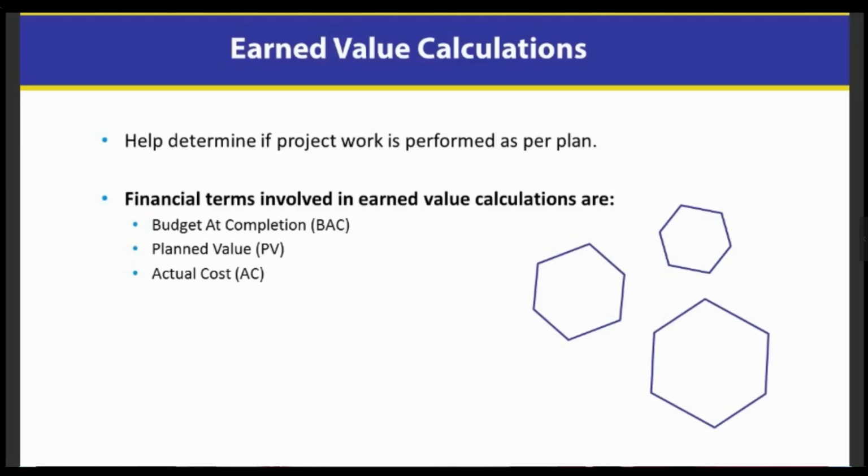Okay, sure. Now, crashing is a little different. Crashing almost always results in being more expensive, so it usually is associated with higher costs. So if the leg of the triangle that is most important is time and not cost, maybe I would consider crashing. And usually crashing involves bringing an external person in, or somebody that's going to cost me more, maybe a higher rate individual, and throwing them at that activity in order to get it done.